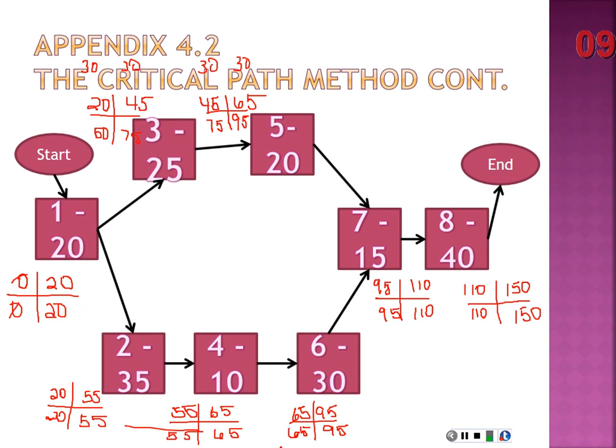If at any time you calculate that slack time and you do the comparison of the latest finish time minus the earliest finish time and the latest start time minus the earliest start time, and they're not the same, you've done something wrong in your diagram. And it's a sign that you need to go back and take a look. Okay? All right. And so again, I just kind of decided it would not hurt after reviewing some of the homework if we walked back through that. It seems like you've got a pretty good handle on it. Okay?